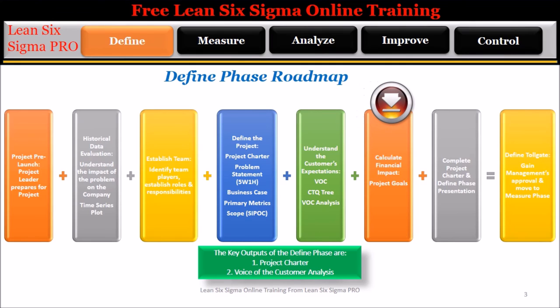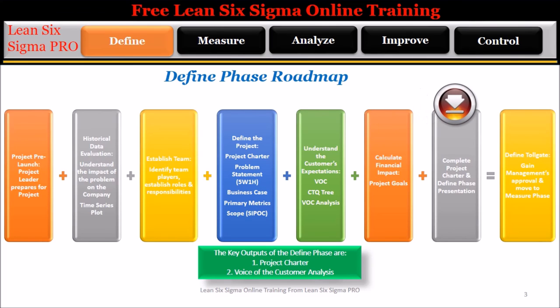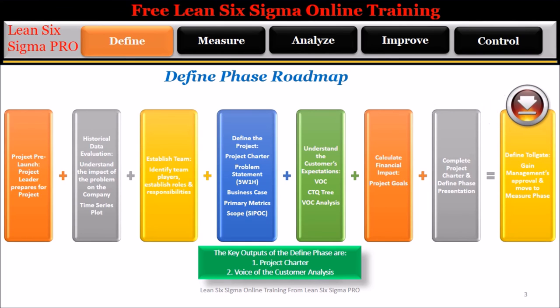Step 6: Calculate financial impact based on the goals set by the team identified using the historical data. Step 7: Complete the project charter and the define phase presentation. Step 8: Define tollgate — gain management's approval and move to the measure phase. The key outputs of the define phase are: 1. Project Charter, and 2. Voice of the customer analysis.